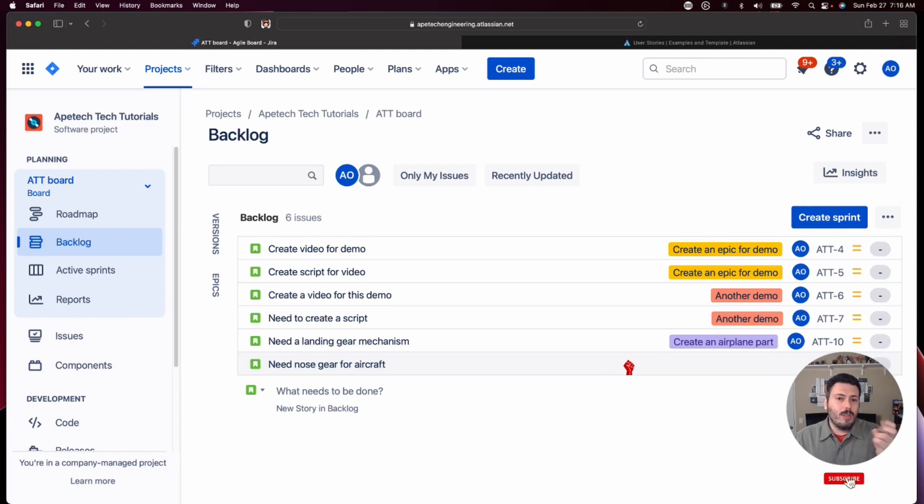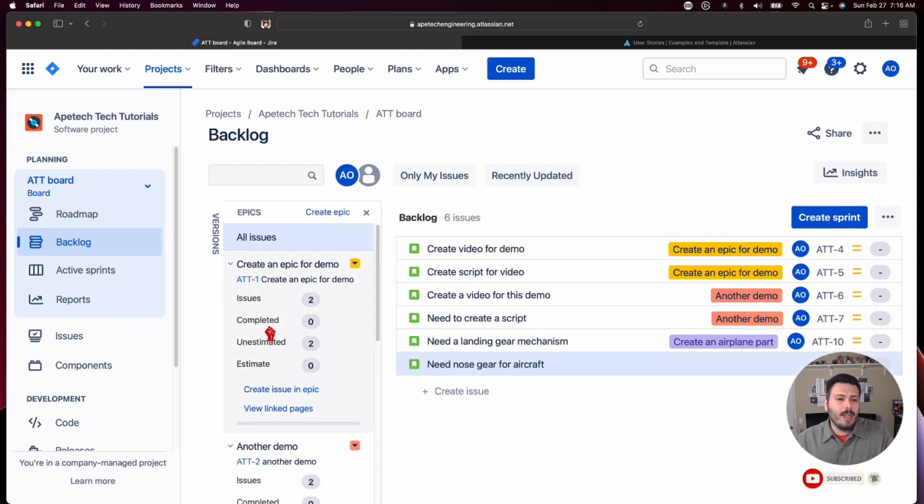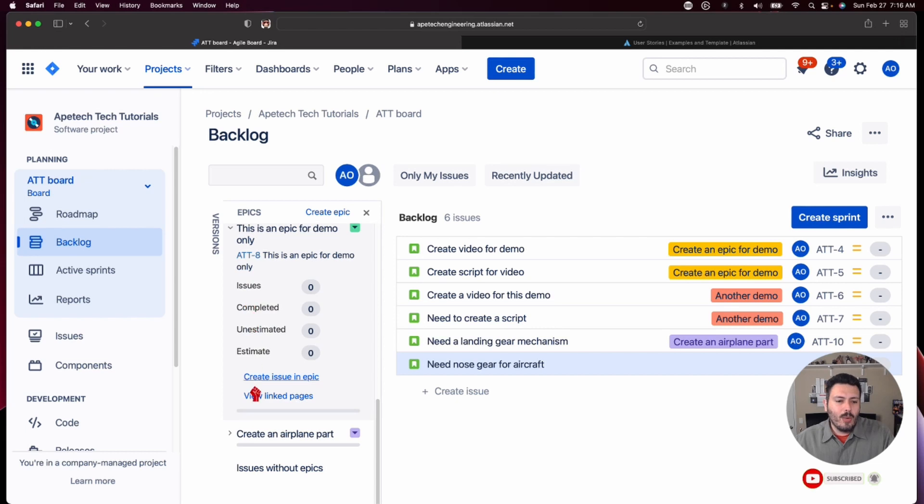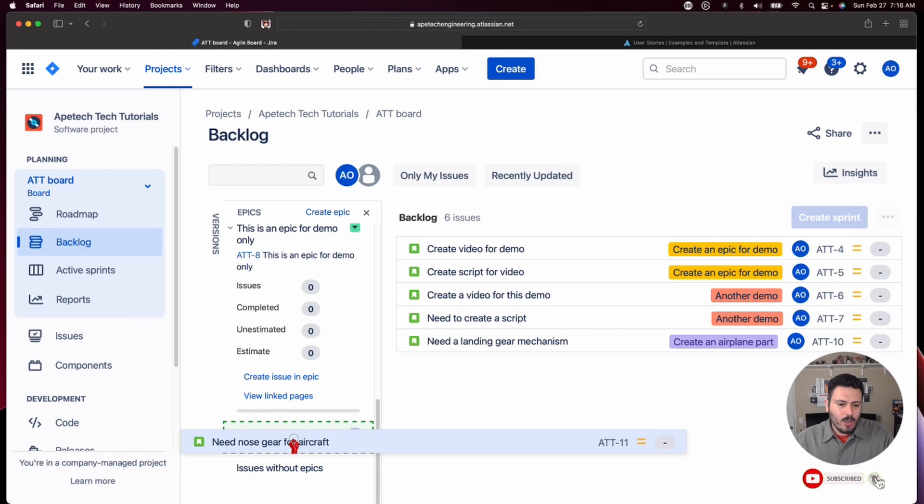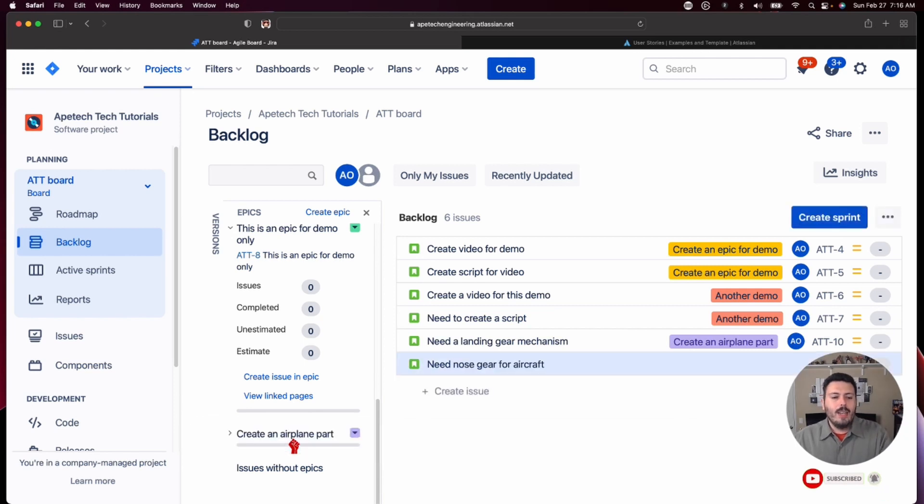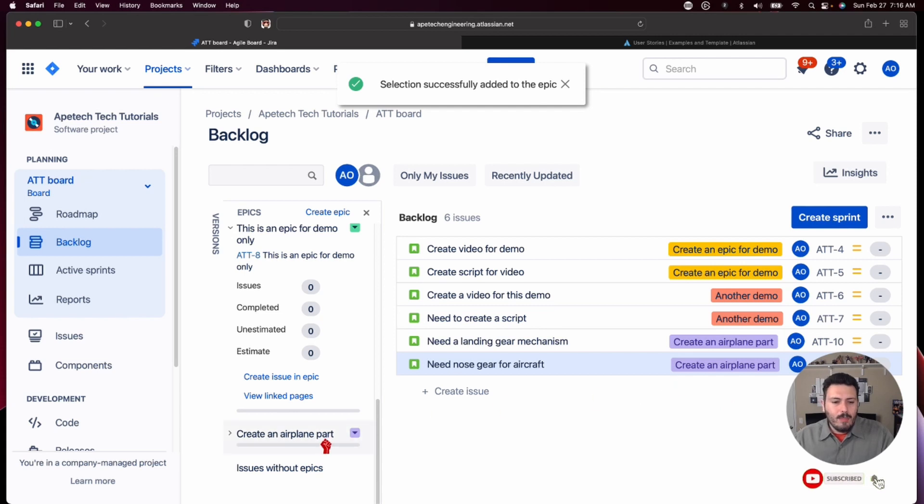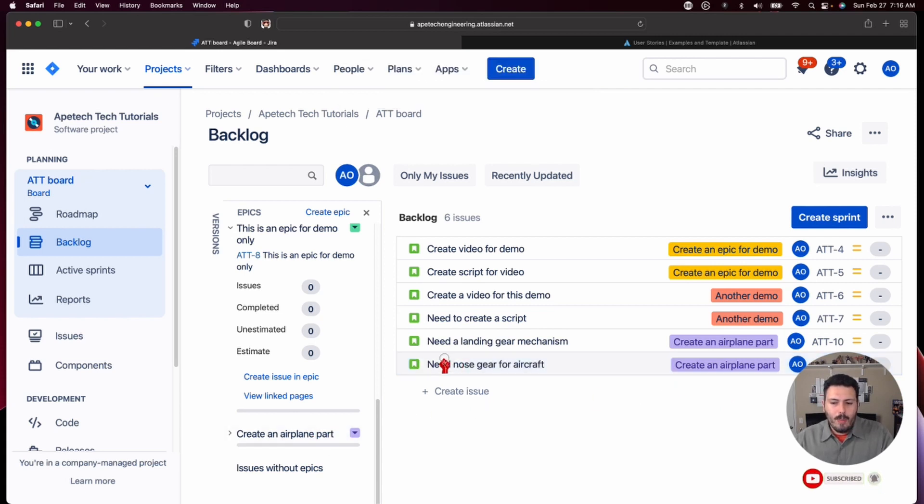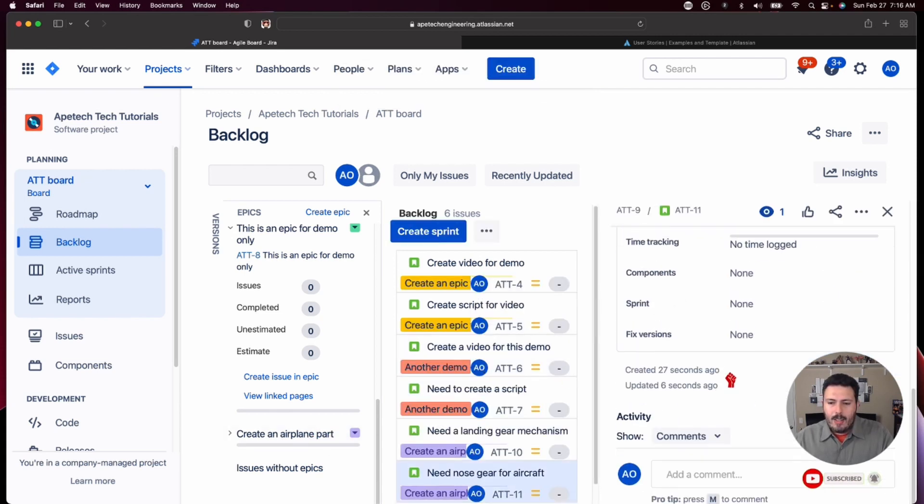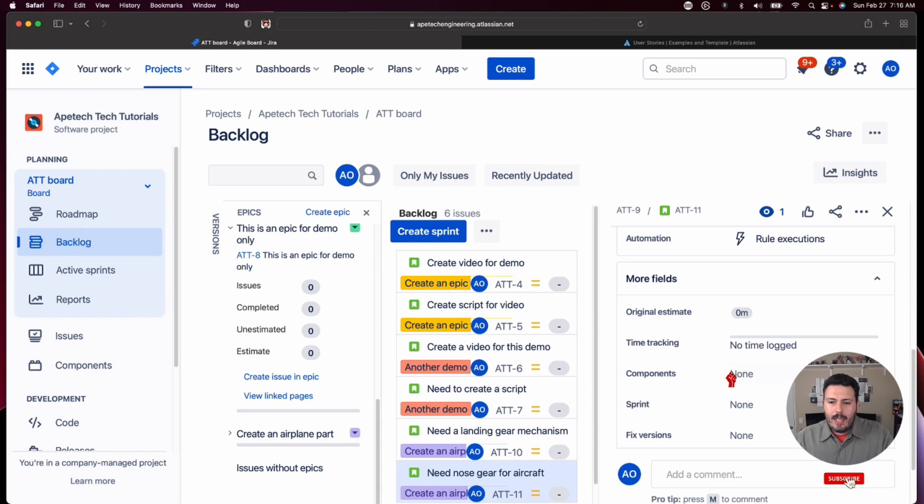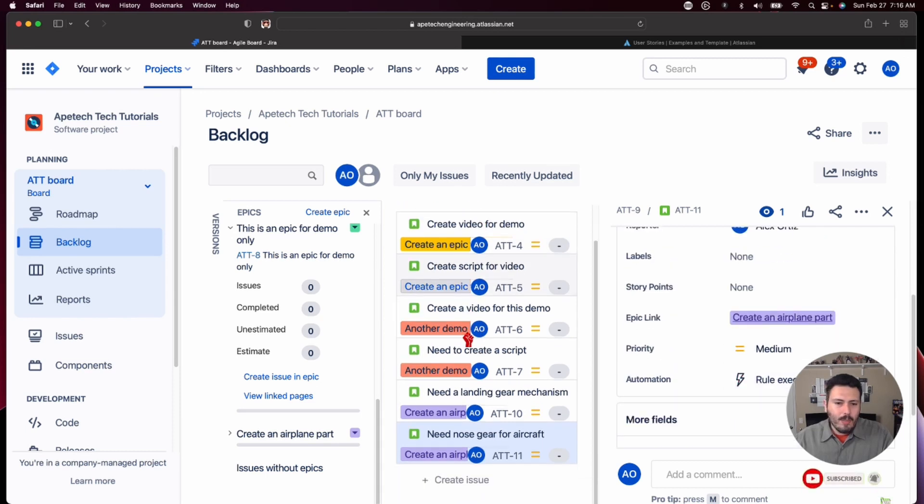So you can, from here, you can do one of two things. You can either do what I like to do just because I like drag and dropping, but you can grab your epic, which is create the airplane part. Then you can just grab this one, drag and drop it. You'll notice a little green outline. You drop that there. And now we have the association between the story. If I open up the story, AT-11, you'll notice that that epic link is filled out.